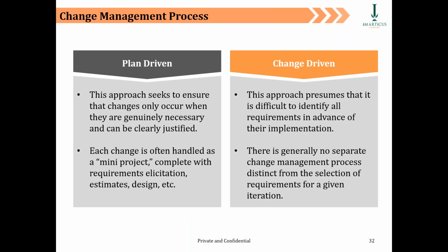Because changes to an existing scope are so prevalent, the business analysis industry was forced to bring out two different approaches within the change management process. One change management process is called plan driven. Here, at least you have a certain heads up. You have a certain forecast on the changes that are coming in. And through this approach, you seek to ensure that the changes only occur when they are genuinely necessary.